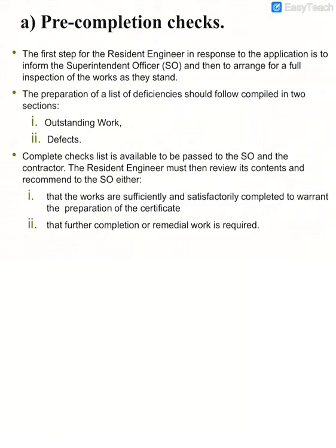The resident engineer is the lead supervision engineer on site, so he has to advise the SO whether the work is satisfactory enough to warrant the certificate, or the contractor still needs to do the remedial work or complete the project.